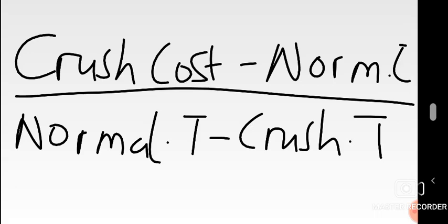So you've done that part. You create that table as earlier shown on the screen. But what are we crashing? The critical path. Take note of this. What I've done is take an extract of the table and focus on the crash limit and the cost per day of just the critical path, because that's what you're crashing. That's your main focus.